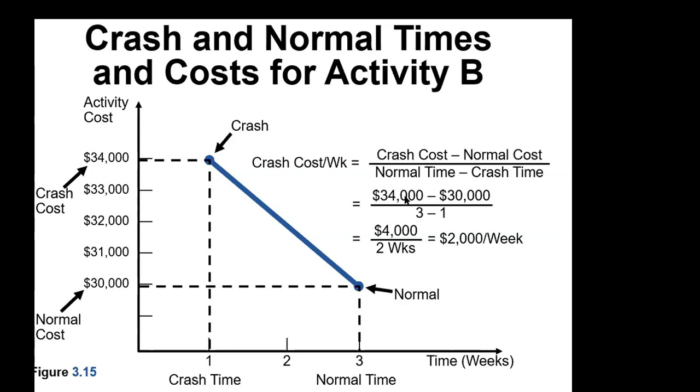And what is that additional cost for? This is normally for adding machines to speed up the process or hire some new employees to complete the work faster. The difference of the costs from normal to crash is $4,000. We're crashing 2 weeks here. That's $2,000 per week.